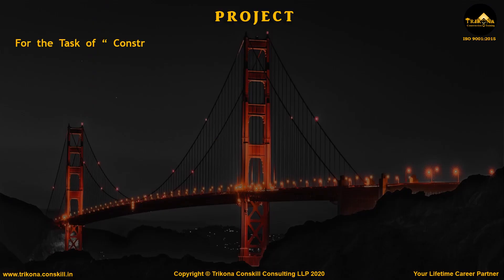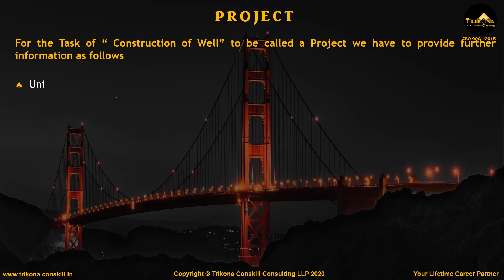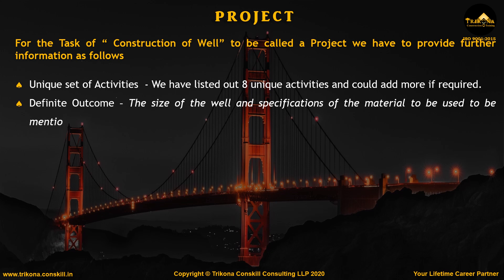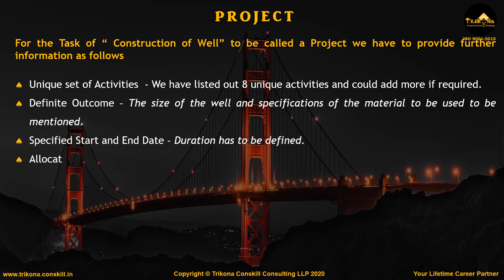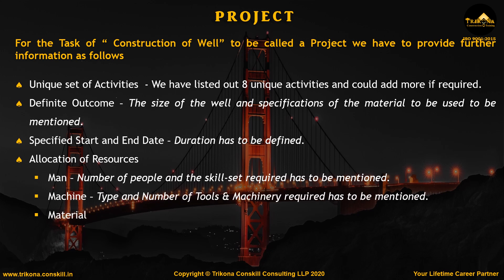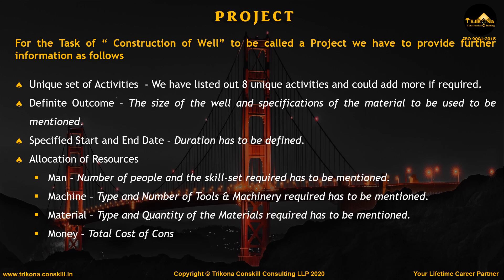For the task of construction of a well to be called a project, we have to provide further information as follows. Unique set of activities: we have listed out eight unique activities and could add more if required. Definite outcome: the size of the well and specifications of the material to be used must be mentioned. Specified start and end date: duration has to be defined. Allocation of resources — Man: number of people and the skill set required has to be mentioned. Machine: type and number of tools and machinery required has to be mentioned. Material: type and quantity of materials required has to be mentioned. Money: total cost of construction of the well has to be mentioned.